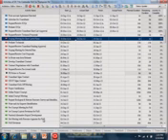Any other questions about updating the activities or anything to do with activity views in the schedule? You say that you can go in and you change the activity percentage complete? Yeah, and it depends on what you have listed as your percent complete type. You can only manually update an activity percent complete if it's set to physical percent complete, which basically says I'm going to manually update it.